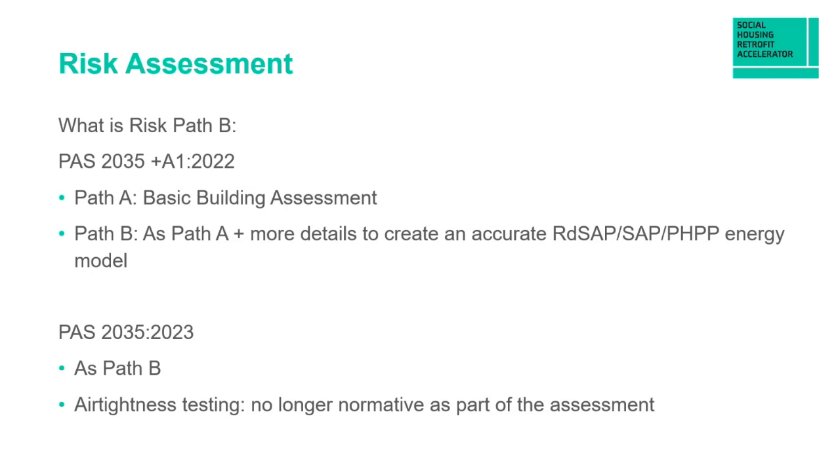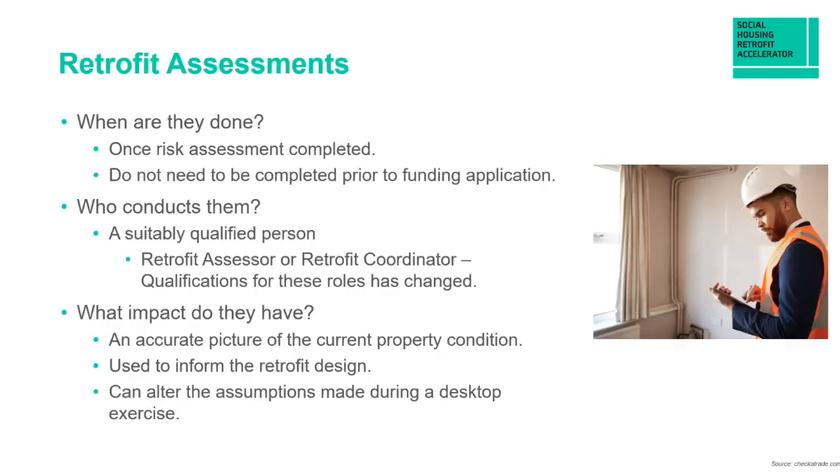And as I mentioned, air tightness testing is no longer normative as part of that assessment unless you've included it in your strategy. So who carries out the retrofit assessments, or when are they done? Retrofit assessment is carried out once you've done a risk assessment of the property, and they don't need to be completed prior to your funding application.